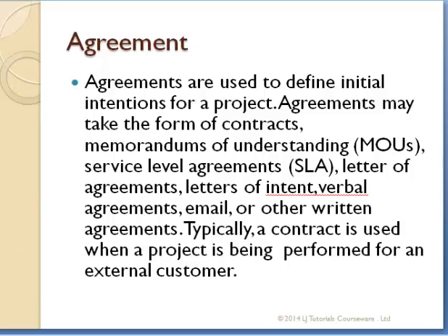form an agreement in the form of MOUs, SLAs, or a letter of agreement, saying, maybe you bring 45% of the cost, I'll bring the remaining 55% of the cost, but I would have the upper hand in making decisions or governing the project. Now, the agreements are just a guide. They are structures that we are putting in place that the project can go by.